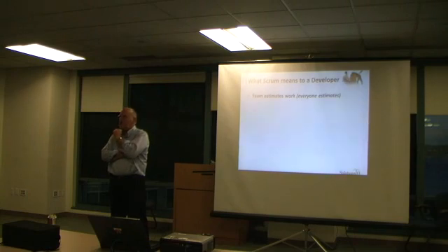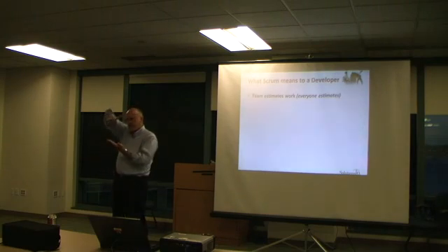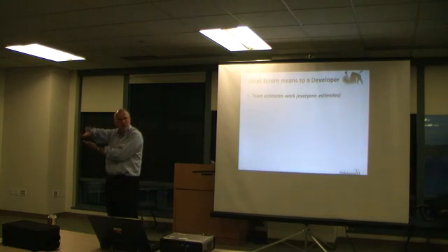It's just hard. You can get better, but as was stated, part of what Agile and Scrum say is do your best, but realize that estimates are, in the end, some guesses. We're not going to approach some kind of perfection. We get better if you follow McConnell's cone of uncertainty down. As you get nearer the work and the work gets smaller, your estimates get better. So Agile acknowledges that by saying, decompose your stories, do them in a sprint's worth instead of 6 months worth of time, and really focus on, at least initially, multiple levels of estimating, right?